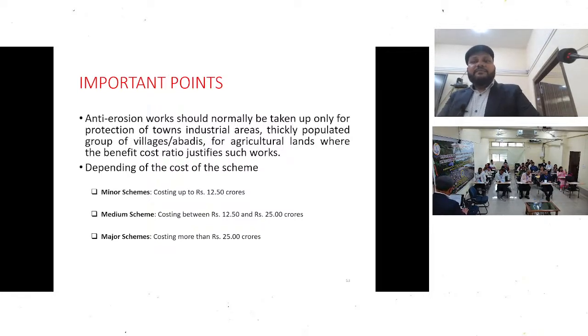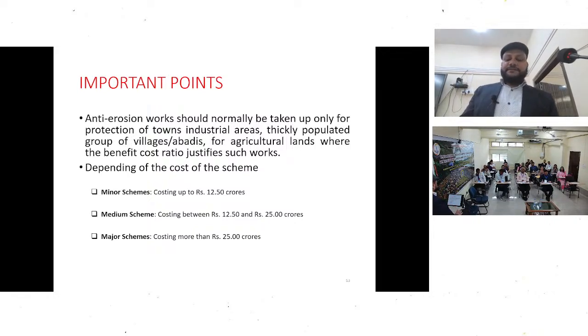And if it is a major scheme, then it should go by this route: Central Water Commission, Brahmaputra Board, Ganga Flood Control Commission, but it will be cleared by a committee of the Central TSC, which is headed again by the Secretary, DOWR. Then we have to plan our project accordingly.